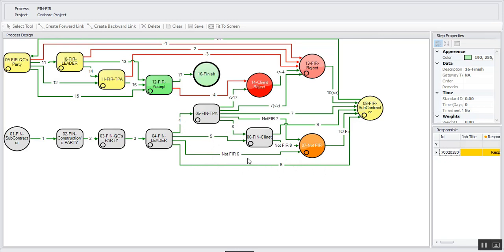When we reach step 8, which is FIR subcontractor, every party has agreed the inspection and inspection date and time has been decided. Now the subcontractor has to attach the inspection report in the system, and the work continues, so that other steps decide the status of inspection reports.